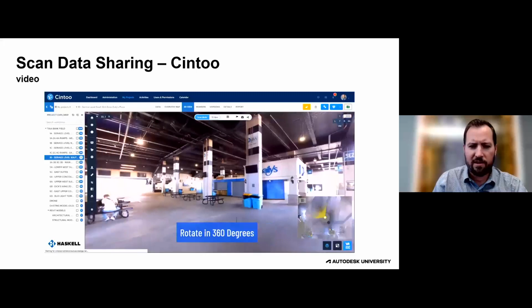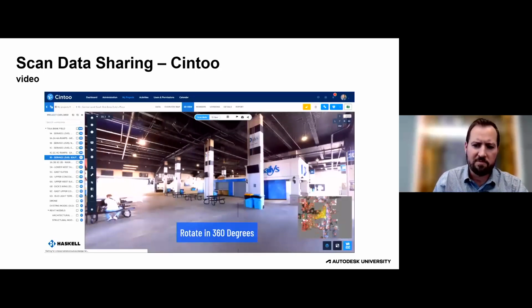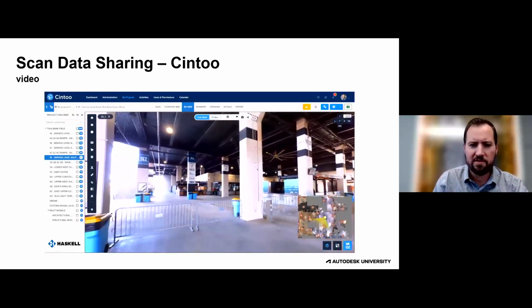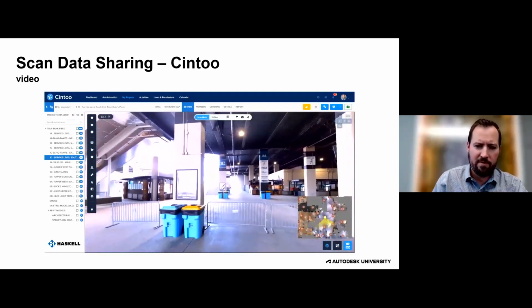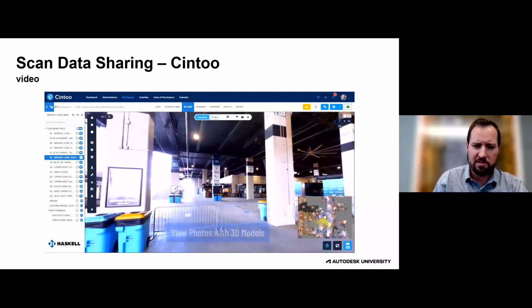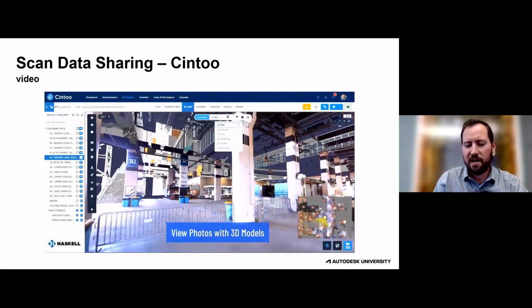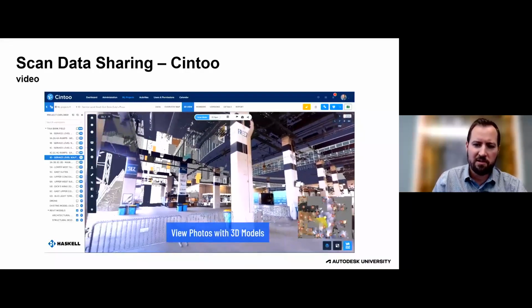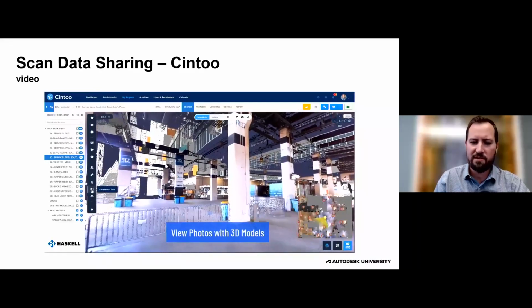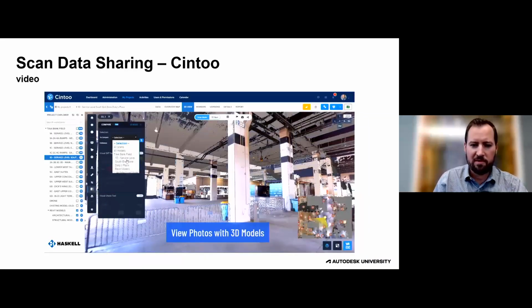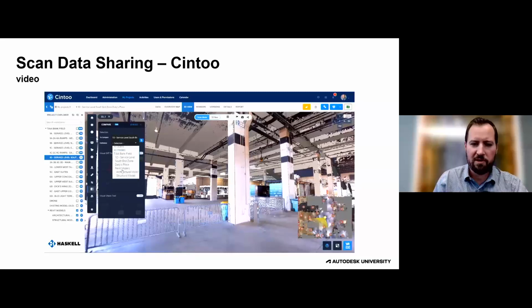Here we're looking at a concession area called Daly's Place, in front of the Daly's Place amphitheater on the south side, near the south end zone. And we also have the ability, you see there on the left, all those 3,600 scans, we can also toggle on Revit models in progress. This is a really handy feature, so we could see how we're doing on the modeling side and see if it's matching the scans, and use that to facilitate the model reviews we're doing on a weekly or sometimes multiple times in a week basis.